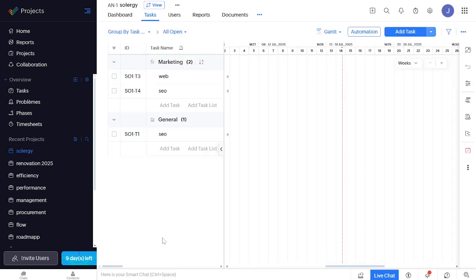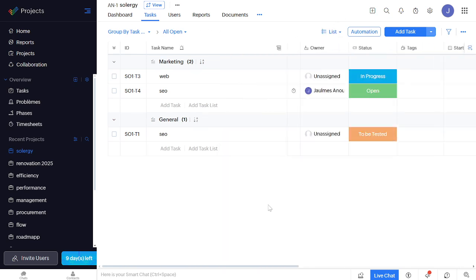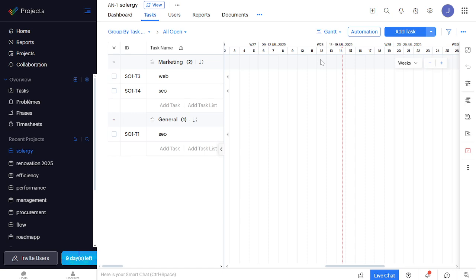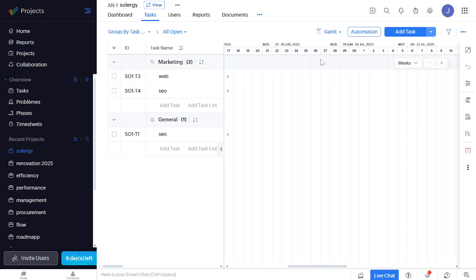The reason we do this is because the Gantt chart draws data from these tasks and milestones to create a visual timeline. Now that you're all set, navigate to the Tasks and Milestones module and click on the Gantt View tab. This helps us because it's the place where the Gantt chart lives. Here, you'll see a bar chart showing the project schedule, including the start and end dates of tasks, their duration,